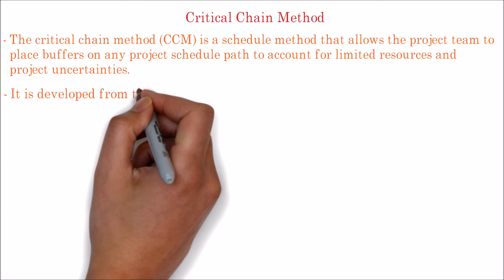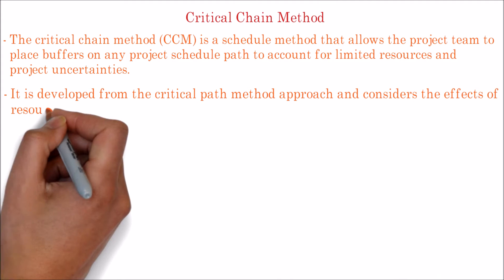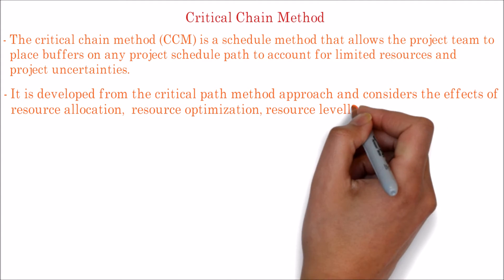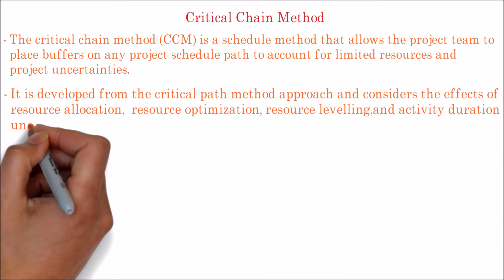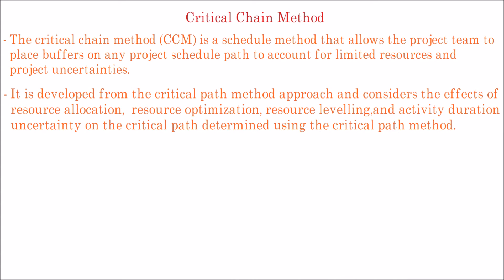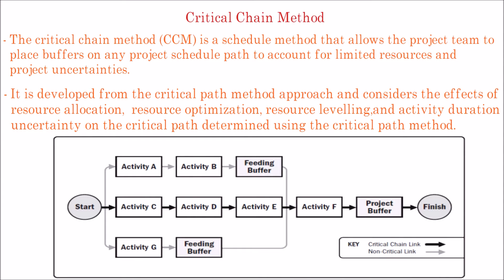It is developed from the critical path method approach and considers the effects of resource allocation, resource optimization, resource leveling, and activity duration uncertainty on the critical path determined using the critical path method.